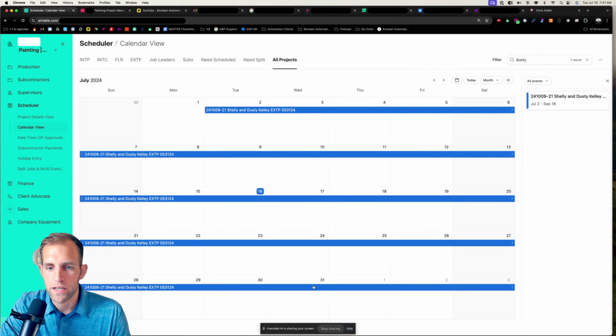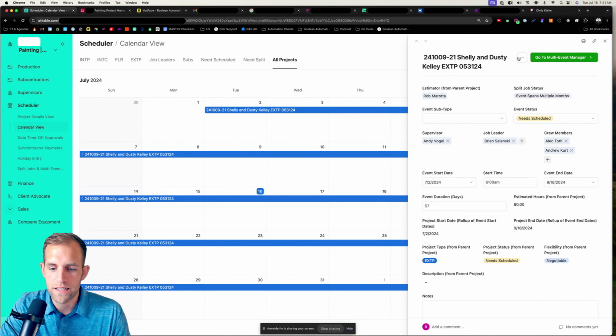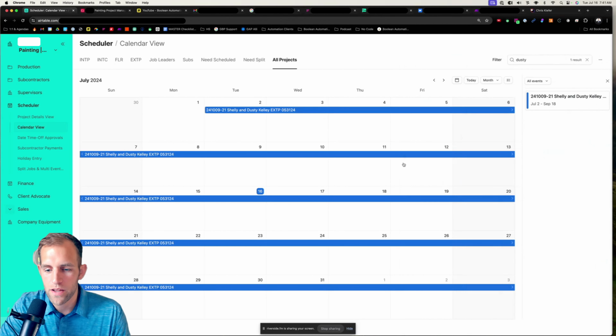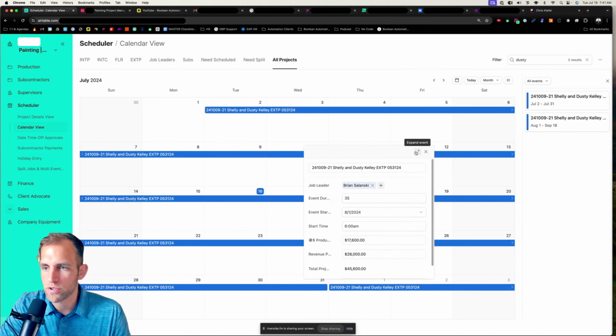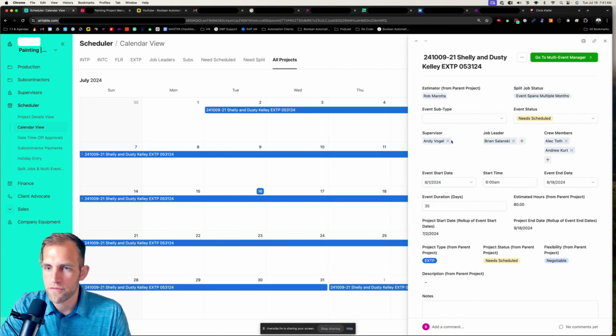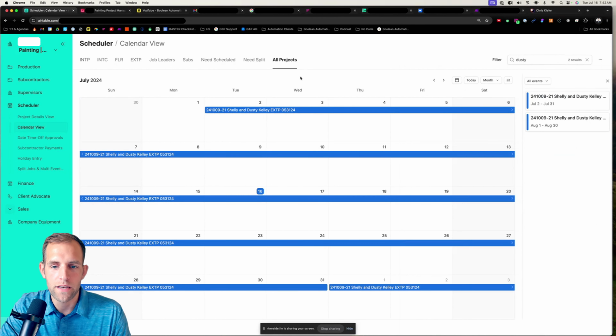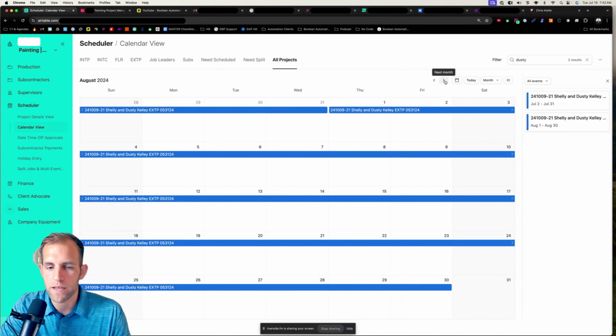So what I've created here is you can expand the event, and I'm going to select split event between months. And then you'll see that it's going to crop off the end of this event. And then it's going to add another event that is extending from August 1st through September 18th. So I need to split this one more time. And you'll see the final event show up here. So now I've got my July event, my August event, and then in September, you'll see that it starts on the 1st and runs to the 18th. So now I have 3 events.